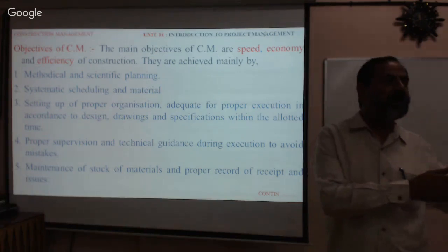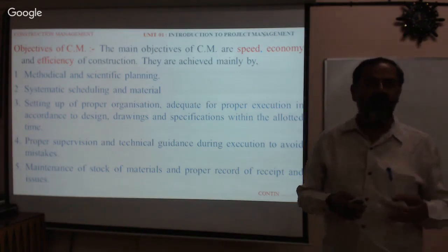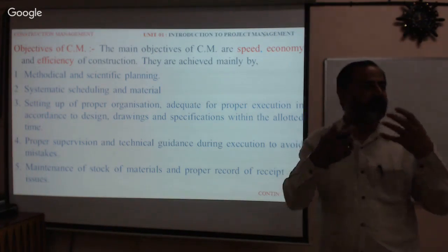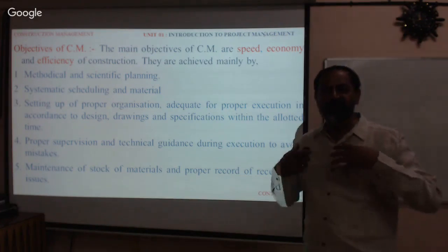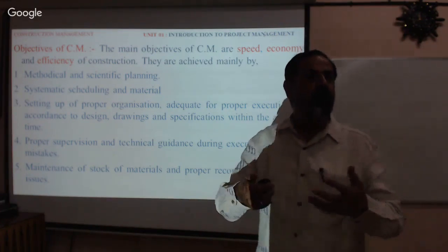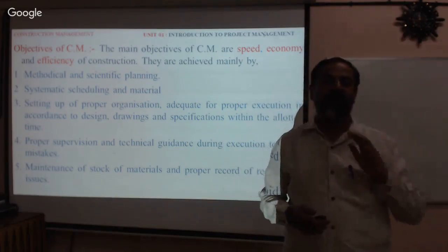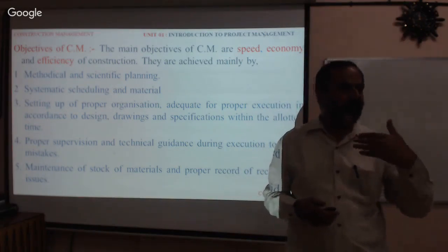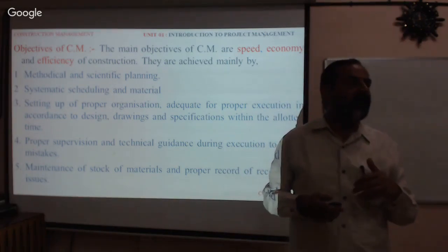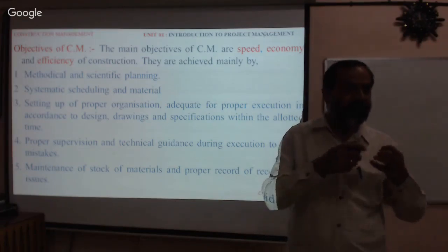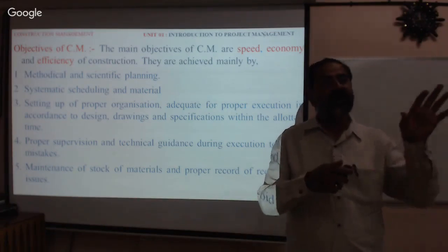Document means when, how much aggregate is required, how much fine aggregate is required, how much cement is required, and when you need it. You don't procure the material for your entire project at once. If you need 1000 bags of cement, or 5000 bags of cement, can you procure it at a time? No, you have to schedule it properly.